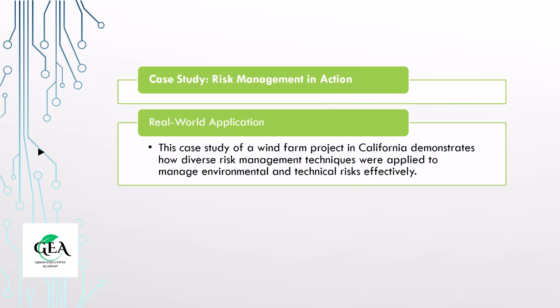On the technical front, the developers applied a reduction strategy by installing advanced turbine monitoring systems. These systems could detect faults early and schedule timely maintenance, ensuring smooth operations and reducing the likelihood of prolonged downtime. Moreover, to handle financial uncertainties, the project utilized transfer by engaging in long-term power purchase agreements with local utility companies,